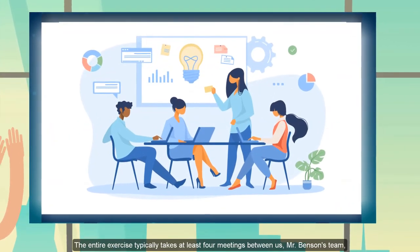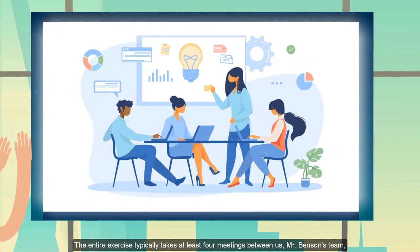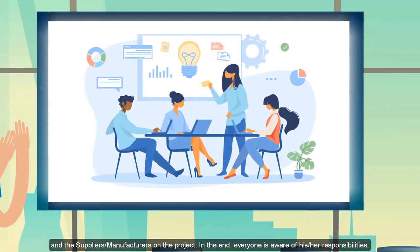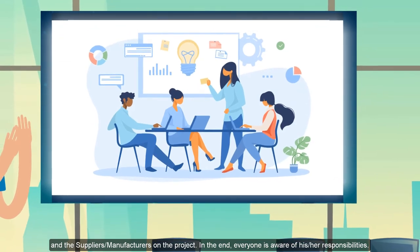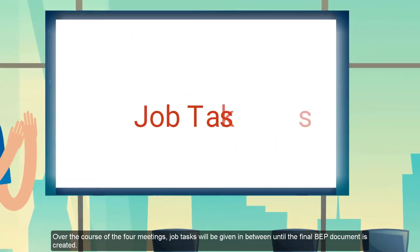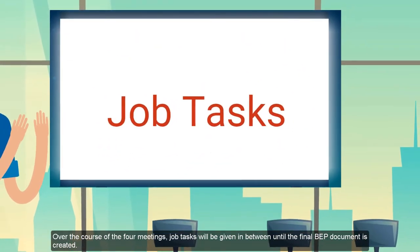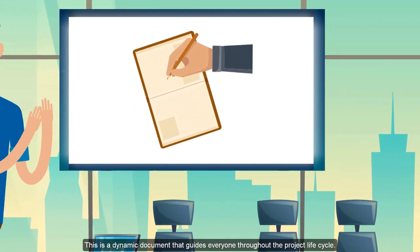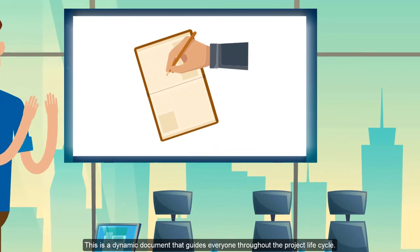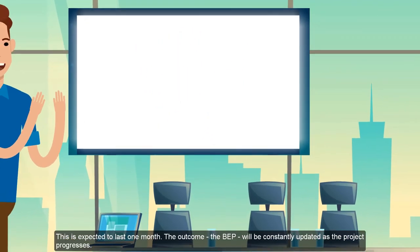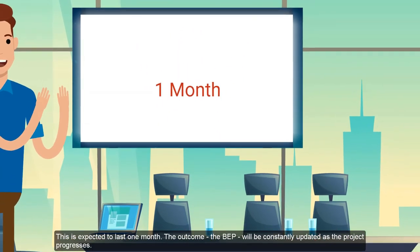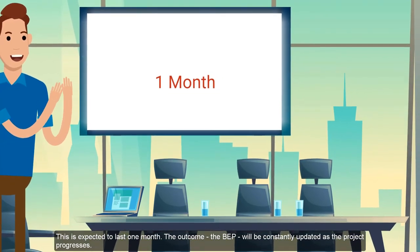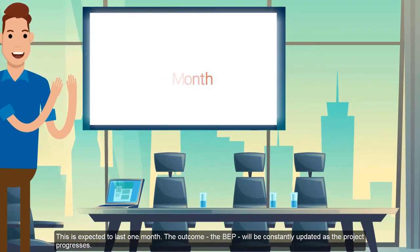This typically takes at least four meetings between us, the services team, and also the suppliers and manufacturers of the project, so that everyone is aware of their responsibilities. Over the course of these four meetings, there will be job tasks defined until the final implementation plan is created. This is a dynamic document that guides everybody all through the process, and is expected to last for at least one month. The outcome is a dynamic document that is updated as the project progresses.